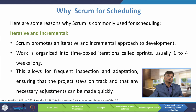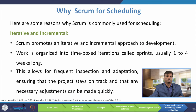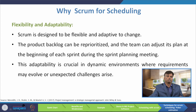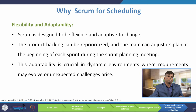The first reason Scrum is used for scheduling is that it is iterative and incremental. Scrum promotes an iterative and incremental approach to development. Work is organized into time-boxed iterations called sprints, usually 1 to 4 weeks long. This allows for frequent inspection and adaptation, ensuring the project stays on track and any necessary adjustments can be made quickly.